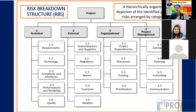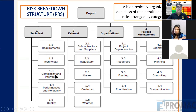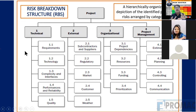This is a sample risk breakdown structure showing how we can divide risk. For this project, risks are divided into four parts: technical, external, organizational, and project management. Under technical, we can further divide into requirements — for architectural projects: aesthetic requirements, instructional requirements, environmental requirements, statutory requirements, IS code requirements. So requirements can be further divided. We create a risk breakdown structure covering all these categories.